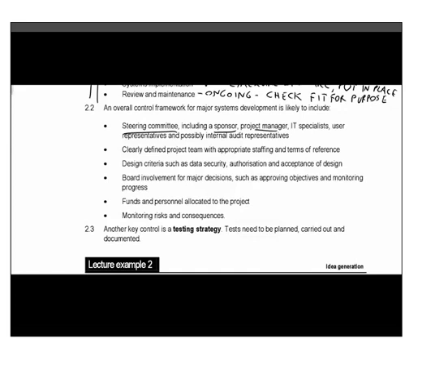So it needs to be overseen by a steering committee that will generally include people like the project sponsor. The project sponsor, remember, is the person who makes resources available. So for a big project, it might be the chief executive, it might be the finance director, it might perhaps be the IT director. You'd want the project manager to be on the steering committee so they can explain to the others what's going on and what the status is.